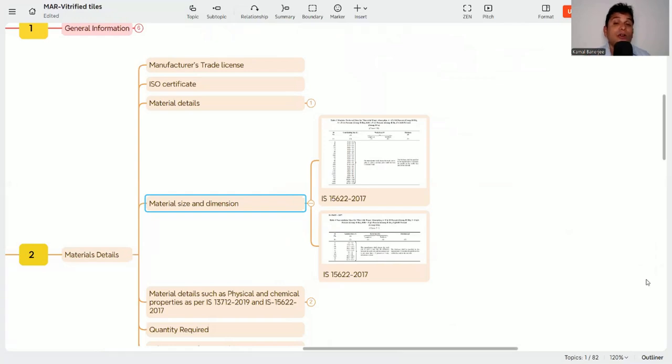is valid. And also the checklist, it varies from consultant to consultant, but there is a checklist that, after the submittal, you need to attach, and then you need to attach the compliance statement, then other documents. Why? Because the consultant or the client will check whether all the documents are there or not, and then the compliance statement, whether everything is compliant or not, then they will check the documents one by one. So first the submittal, then the checklist, and then the compliance statement.